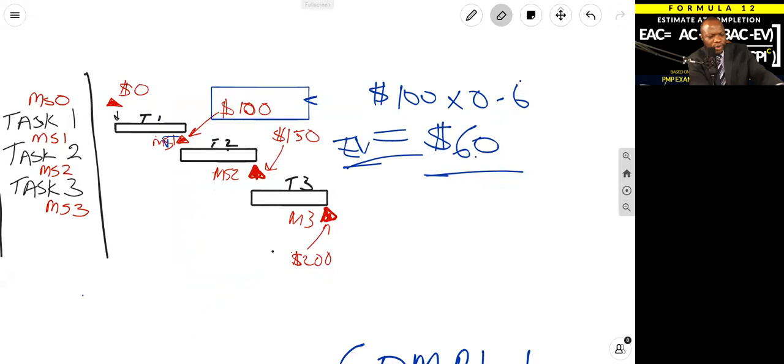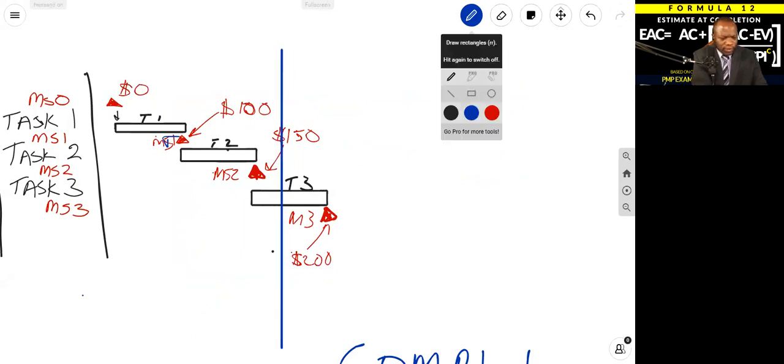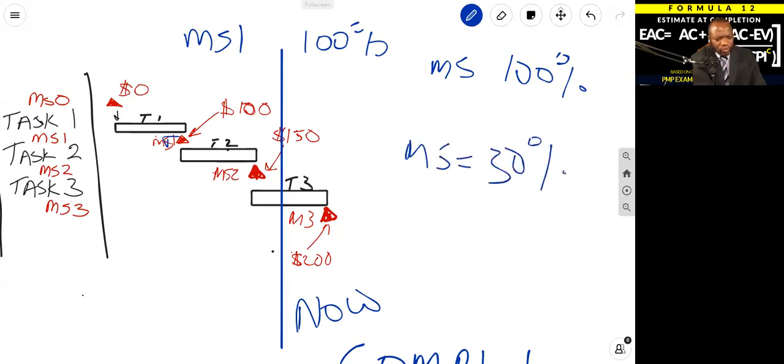If you are proceeding on the project and at a different point in time, you wanted to compute earned value based on certain statuses, you do something like this. Let's say we're here. If that is time now, and you can see, let's say milestone one is 100% done, milestone two is 100% done, milestone three, let's say it's 30% done.